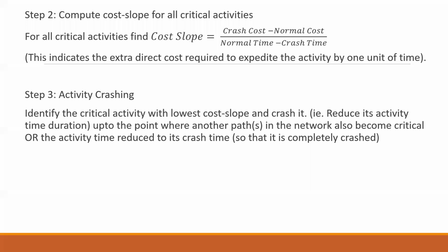Okay, so after crushing, we need to check whether my critical path is changing or not. And as I told you, it should not change. So we have to crush that particular activity to the extent such that it does not change the critical path. That is very important. Okay, if by chance you're crushing that particular activity by the total crush time given to you, then it's fine, no problem.